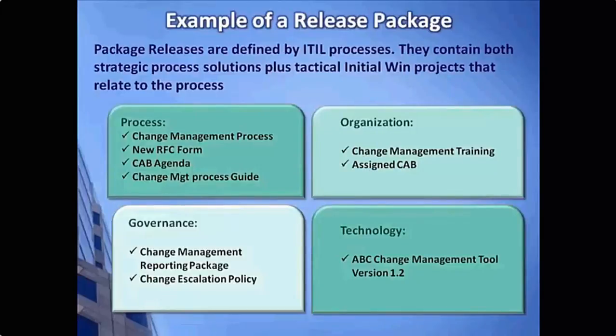It is recommended that your release packages, when you do these, be initially segregated by each ITIL process area for clarity. The elements of an example release package could be done as shown above. Again, this is an example of a change management one. You might have something similar for other ITIL processes. If multiple process areas are to be coordinated and deployed together, their corresponding release packages can be created separately and then combined into a single release that is deployed all together.